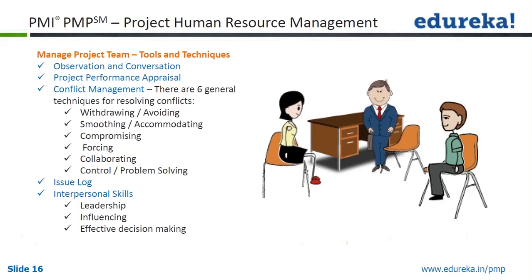If any differences or conflict occur, usually project team members are supposed to take responsibility for the resolution of the issue that is occurring. But if the conflict escalates, then the project manager should facilitate a satisfactory resolution. Conflict should be addressed as early as possible, and usually in private using a direct, collaborative approach. If disruptive conflict continues, formal procedures may be used, including disciplinary action.